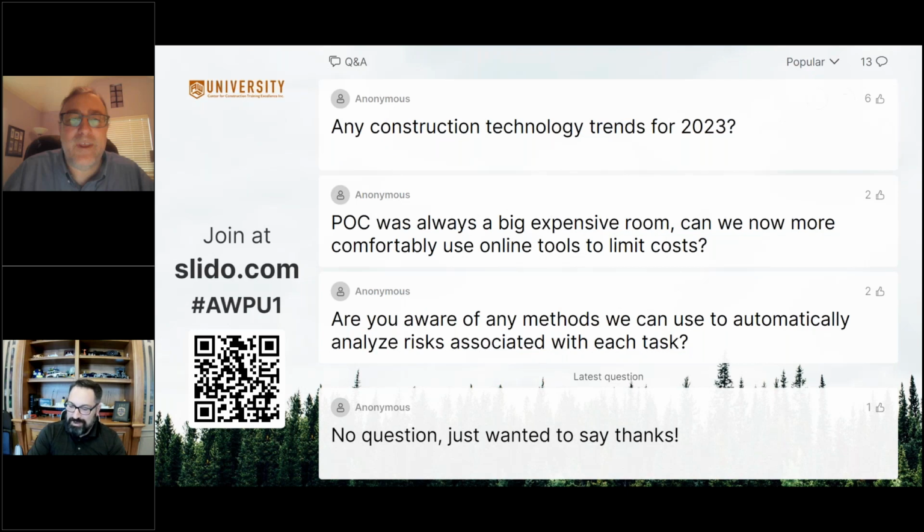Agreed. If they're on staff, if they're early acceptance, then fine. But it's not necessarily in those early phases to include the contractor, because you're making large sweeping planning decisions, CWA identifications and such at that point. And as Eric said, it's more important to get that contract quilt in place than the contractor in the room at that point. That's more a POC 3 or 4 type basis, right?